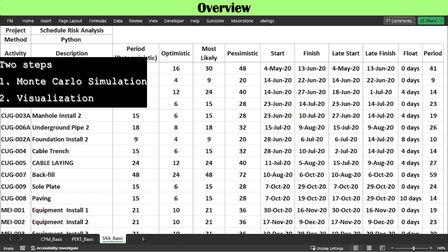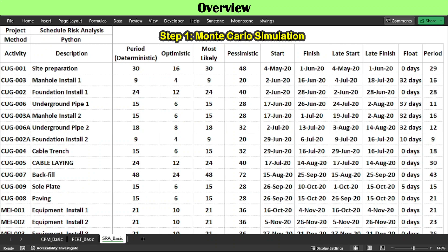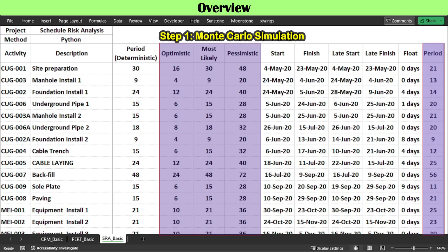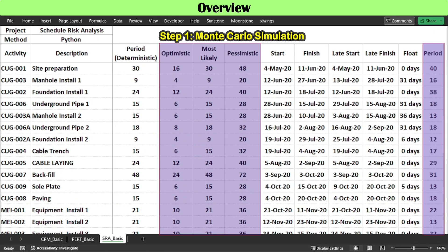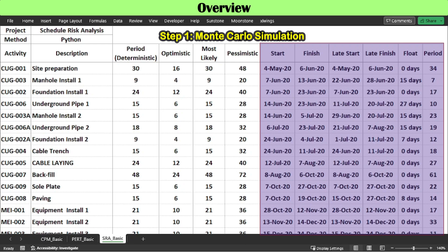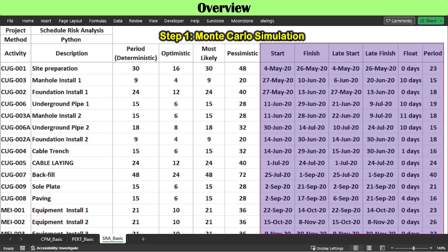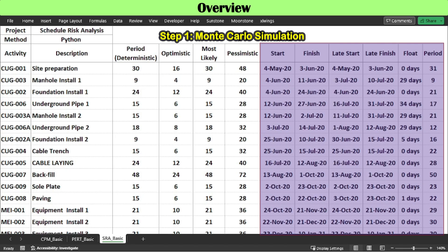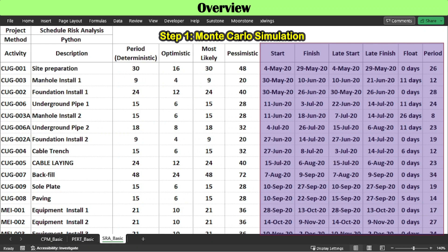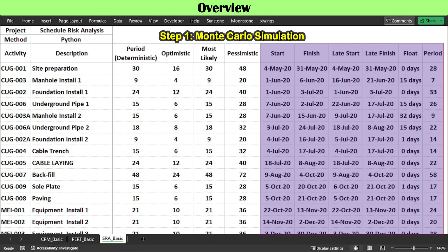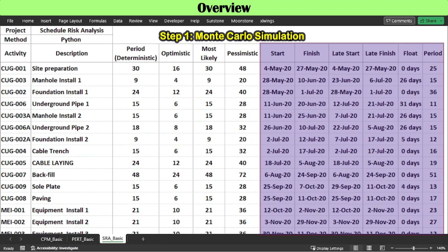Two steps are involved in schedule risk analysis. Step 1 is to adopt the Monte Carlo simulation method. Activity periods each time are randomly selected along a triangular distribution of 3-estimate periods. Critical path analysis is performed 2,500 times, each time based on randomly selected activity periods, and every result is recorded. Project risk indicators calculated include overall or individual activity finish distribution, criticality index, and schedule sensitivity index.